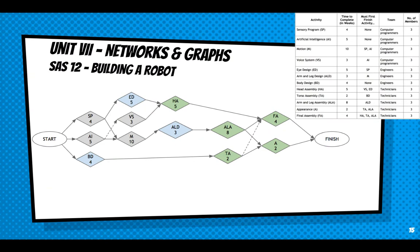Could the total completion time be further improved by allowing people to work on activities outside of their official team designation? Justify your response with appropriate reasoning. Okay. So let's say that our computer programmer guys finish. All right. And these three guys for a week have nothing to do. But they could go help the guys in iDesign, right? Or for that matter, see these four guys in engineering? They're going to go up here at iDesign. But then you've got technicians that are over here that only take two weeks to finish. I mean, you really won't need the technicians a lot. And they can come back here. That's in six weeks. And you can see four and five is nine. These two guys are going to be done in two weeks. And this is not going to be done for a long time. So they can be brought over here and help at head assembly after iDesign and voice system is completed.